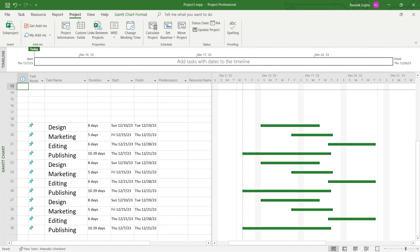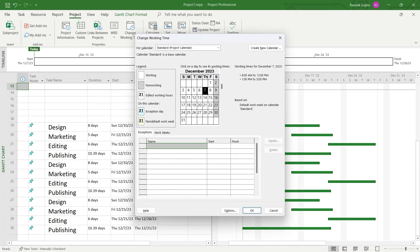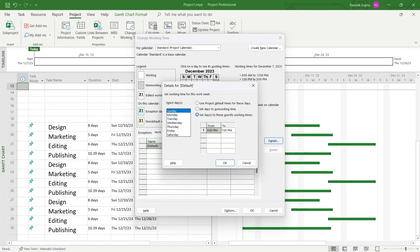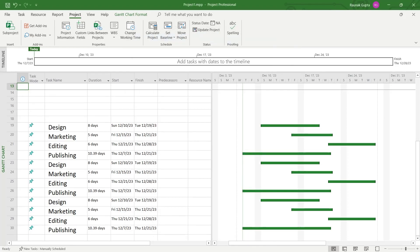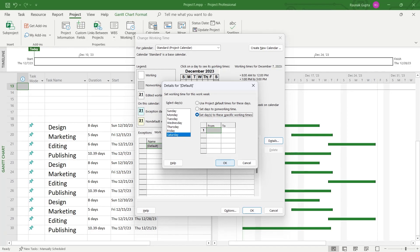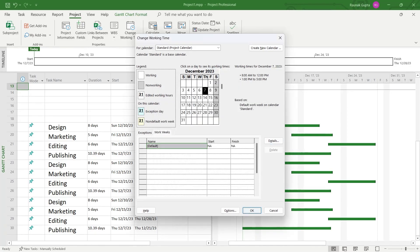You can do the same with other days just by clicking on Change Working Time. Click on Work Weeks, click on Details, select another day as working day, click on OK, click on OK again and that day will be set as a working day for your MS Project.